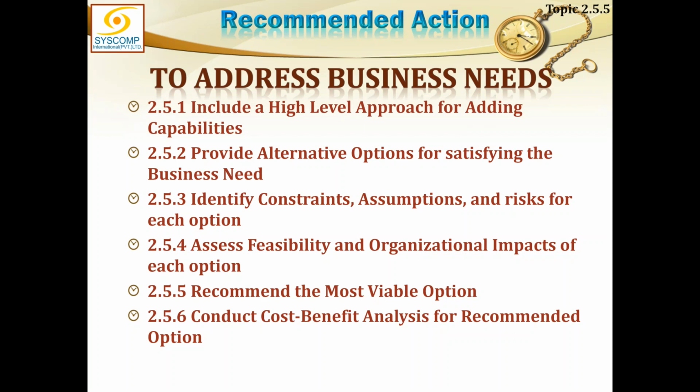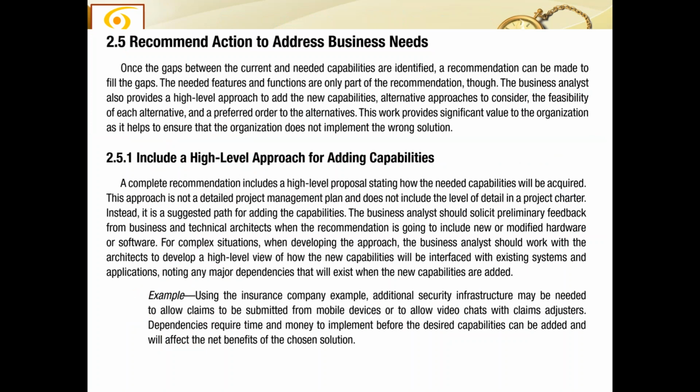So the next step after having done all these four steps would be to recommend the most viable option. Out of the various options you had as alternatives, you are going to recommend one which is the most viable. Naturally, you are going to give reasons for that, and then only conduct the cost benefit analysis of that recommended option, only that recommended option. So I'll just flash the previous slide, which we have already discussed.